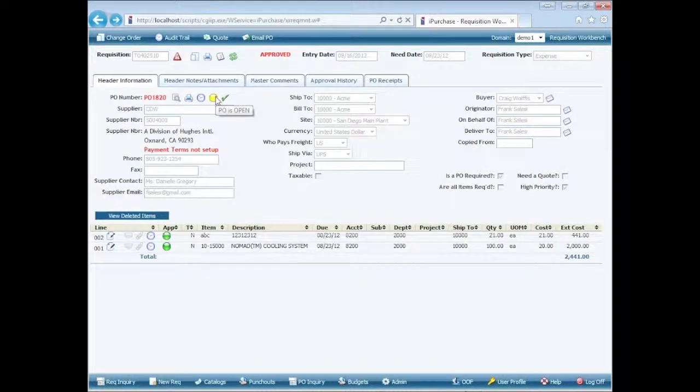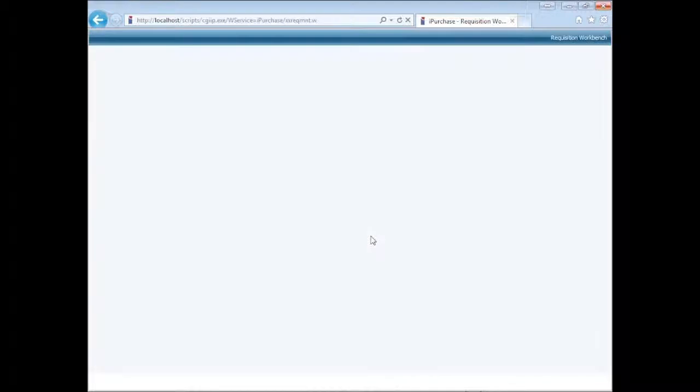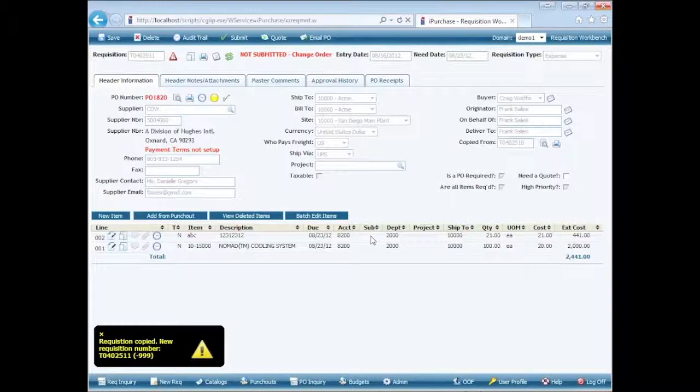This little circle here tells us the PO is still open. It'll change to light green for partially received, dark green, and red for canceled. Now, one thing, the process doesn't end yet. We still can make modifications to purchase orders. That happens all the time. So we have a change order process, based on security. Who's allowed to create change orders? Who's allowed to modify POs?